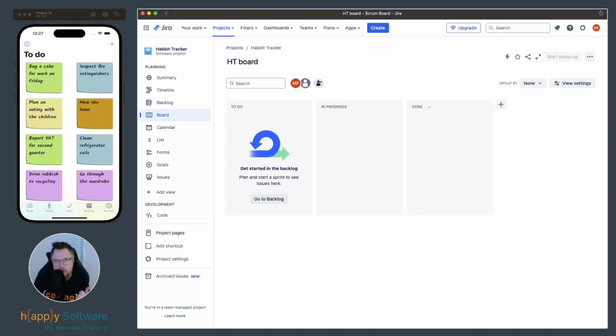and we have to rewrite them. But if we stay focused on who wants this, what do they want, and why do they want it, we can choose the best implementation when we are dealing with that user story later on. So try to stay away from what you are going to do and keep the focus on the problem or the feature that the user wants and why.